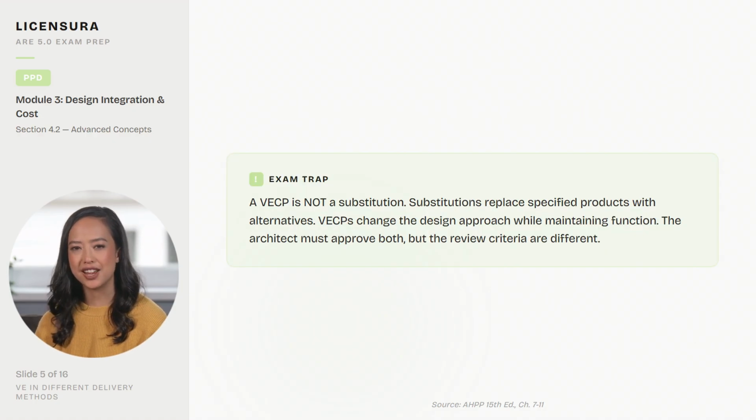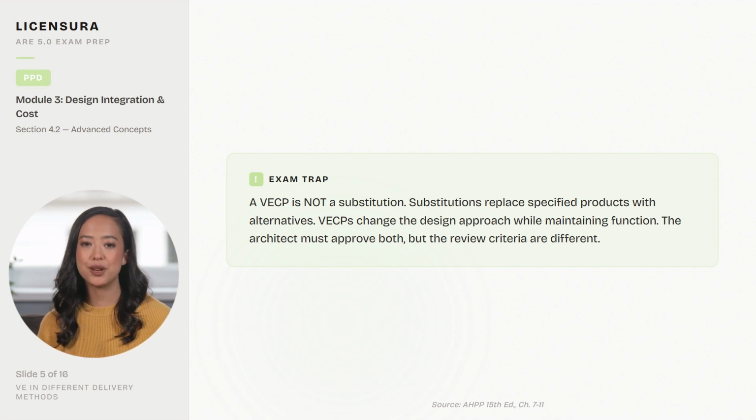A critical warning: a VECP is not a substitution. Substitutions replace specified products with alternatives. VECPs change the design approach while maintaining function. The architect must approve both, but the review criteria are different.